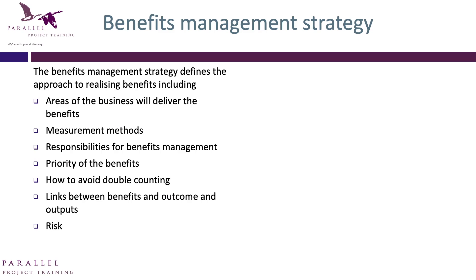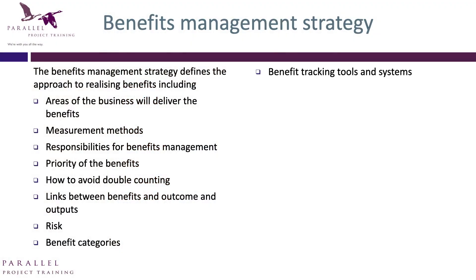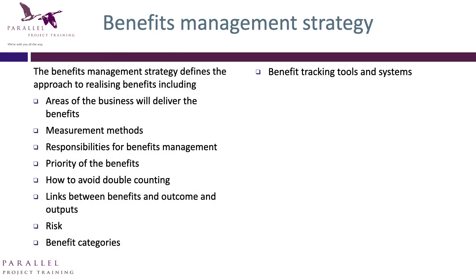What are the risks associated with the benefit — not delivery risks, but benefit risks? For example, people may not want to buy flowers via click-and-collect, so some goods may not be suitable. What categories exist? Long-term savings might be one category, additional sales another, and legal compliance a third — because compliance you have to do regardless. How are we going to track the benefits? Ideally, we build the trackers into the IT systems we're designing, so if we know the measure — say, number of click-and-collect orders — we can create that data field in the database so the system automatically generates the information.